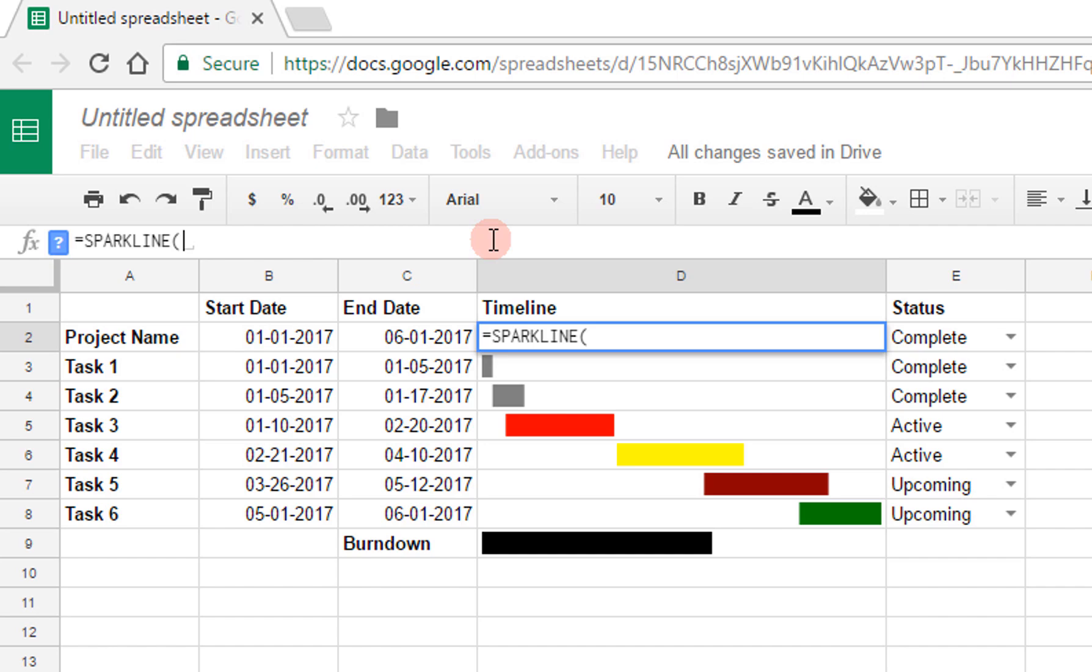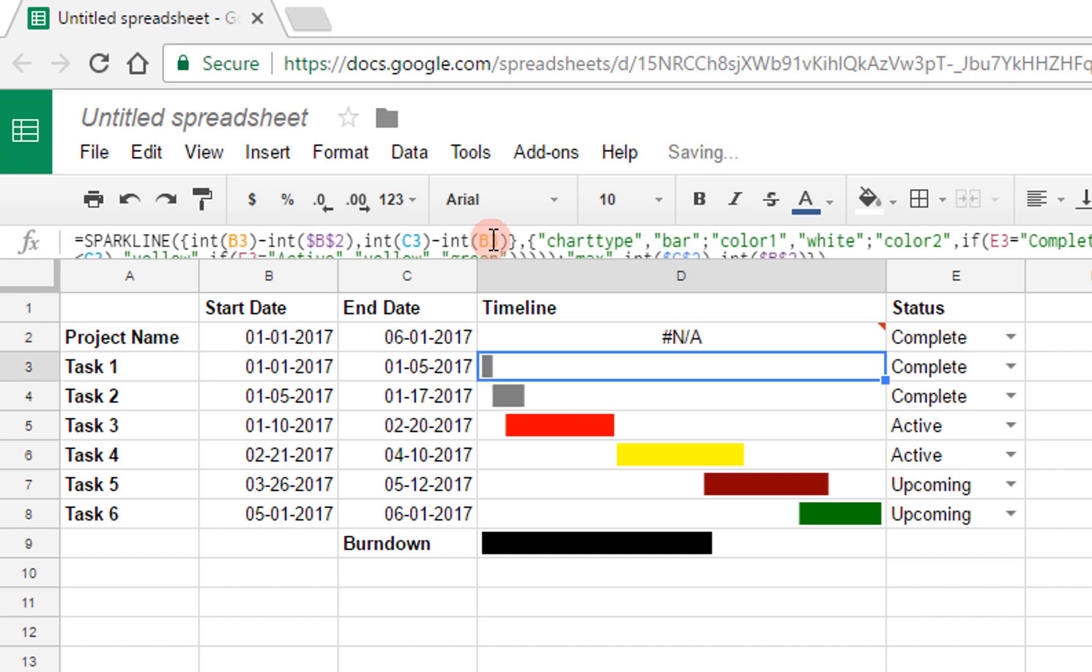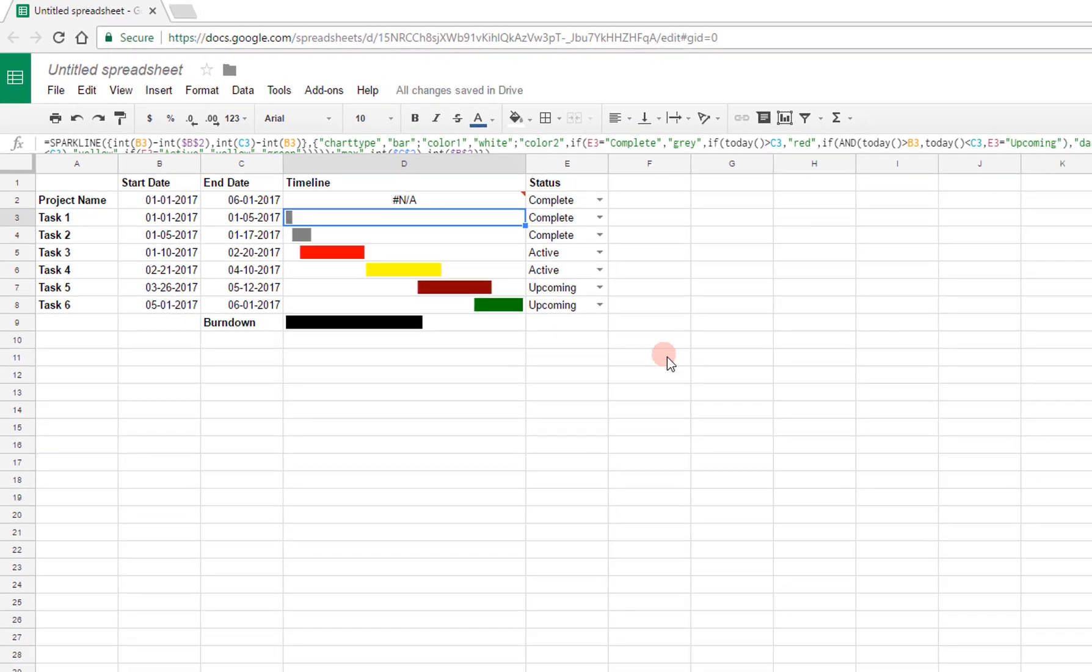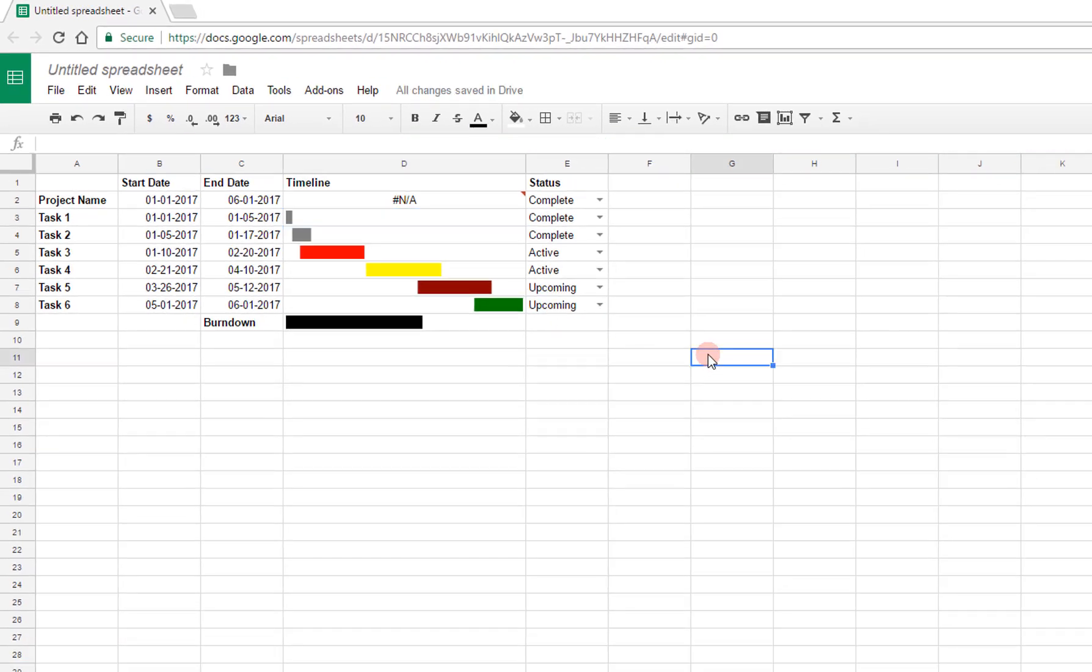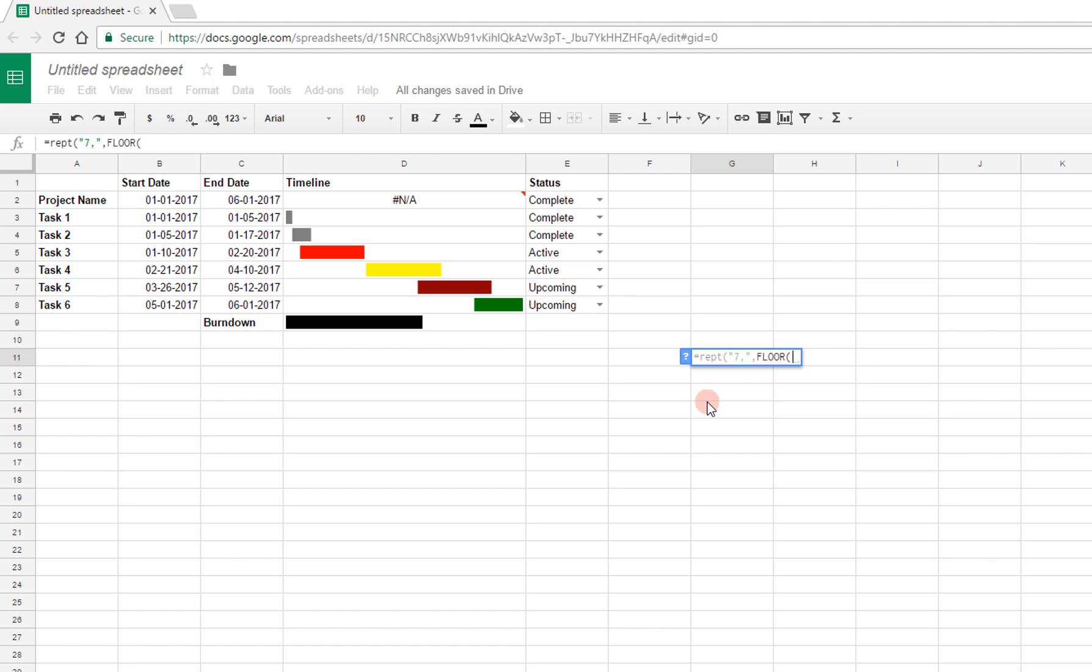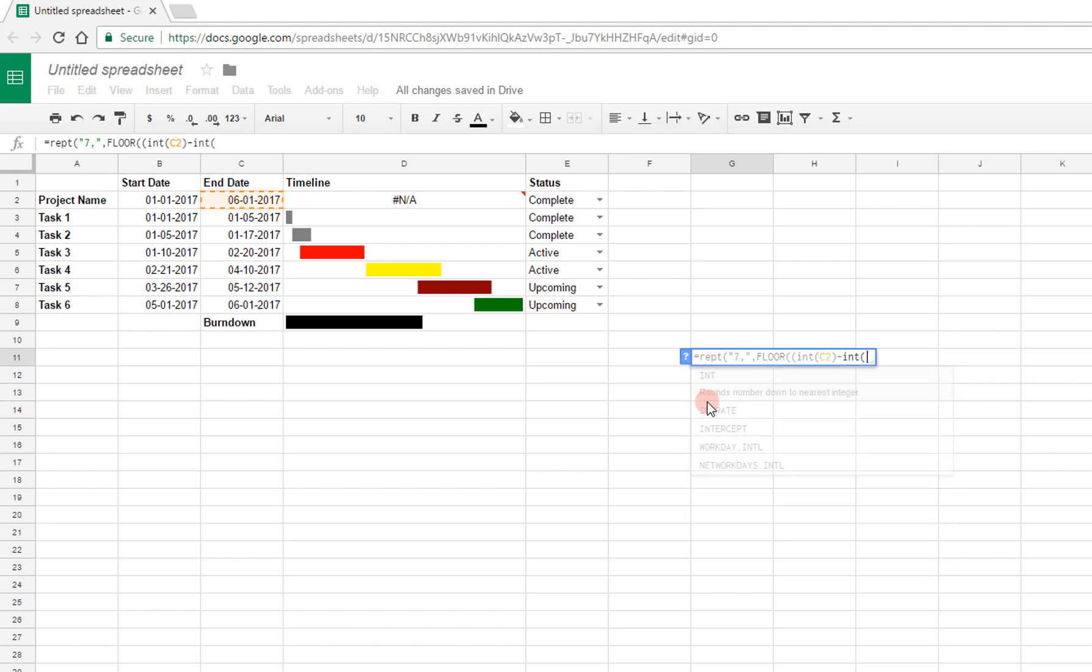So first of all, before I actually do this, I'll just close this for now, and not do anything, I want to show you what I'm going to use. So just in a random cell over here, I'm going to start typing, and the first one I'm going to do is using a repetition function, I'm going to repeat the number 7 with a comma after it, and I'm going to repeat it basically the number of times that 7 divides the span of the project, but I want to make that an integer, so I'm going to floor it. Floor will basically just cut off whatever decimal you have after the division operation is performed.